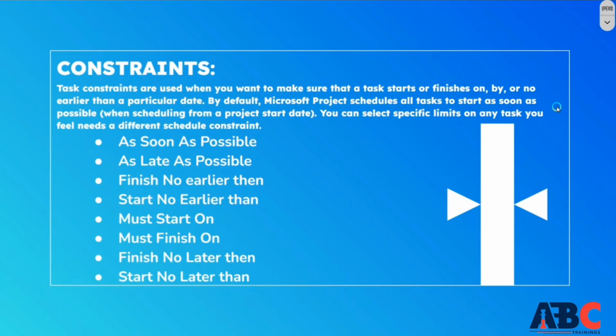When we specifically have a project task that you have to start on a specific date, or a deadline further ahead, the task is not going to be completed on the same date. So for this, a constraint helps you to mention it in the project, because when we add any task or any schedule in the project, the dates automatically keep moving forward. Like you keep changing the task, so the changes keep happening. But as you apply the constraint, it will override the changes you are making in the task.